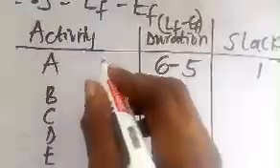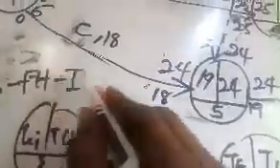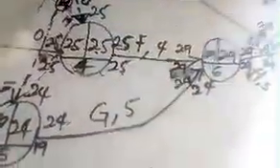Then you know your critical path method and your BFHI. You still remember you have your critical path method as BFHI, so you just write your B for your BFHI. You just fill it very fast. Your activity will be 0, that will be 25 minus 25, 0. Your C, you have it. You know it's BFHI. My F, if you check your diagram for F, you have it as well, 29 and 29.